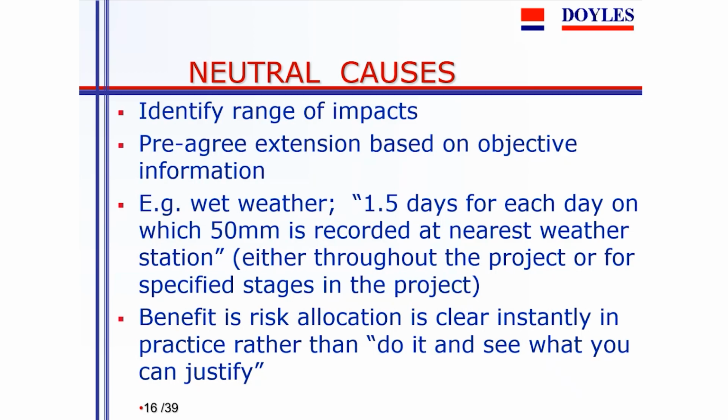I was speaking at a seminar recently, and there was a state manager of a major contract there, and he identified that weather was a very substantial risk. It obviously wasn't controlled by either party, but it had a massive impact. So you might have 3-4 weeks of wet weather that prevented much work being done, and the contractor had to bear all these overheads during that period, and also had to bear the wages and other costs associated with it.